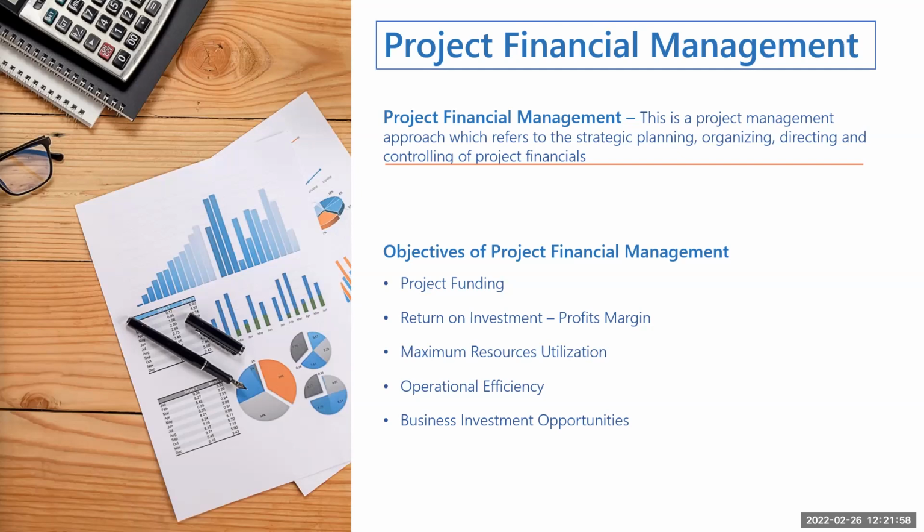It also supports operational efficiency. So operational efficiency means, in a company or in a portfolio of projects, once we are tracking our budget regularly, it helps us to know which projects are underspending, which projects are overspending, which projects we should invest more money into, and which one we should reduce money on, because we have financial management in place. And that involves managing the budget, the forecast, and the actuals. So we are tracking how everything is going alongside.